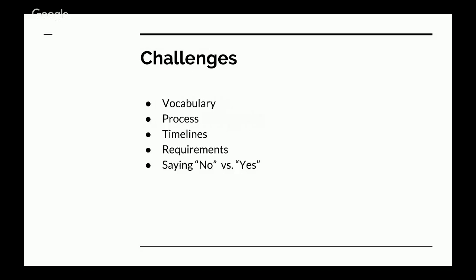It's more of a, here's the prototype. We know it's pretty rough. We want your feedback so we can make the fixes now, propagate them as we build out the rest of the product and the site. And then hopefully when we get to the beta release, which is the last step before launch, we'll have ironed everything out, and any issues should be new ones if they're being brought up, and hopefully they're pretty minimal.